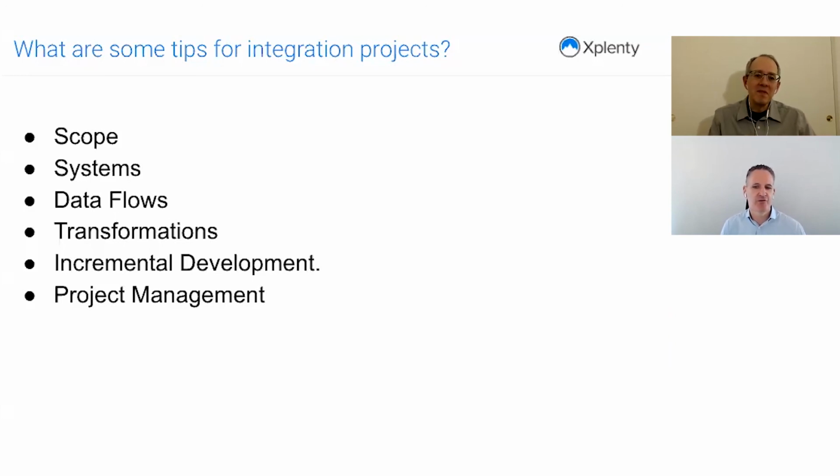And then I'm a big believer in constant communication about a project. So ideally having artifacts about the project, like what happened this week, what's going to happen next week, what are the risks, if there are risks that have changed, and then making sure everyone's aware of the decisions that have been made. So down the track, people can't say, well, I didn't know about that, or I never agreed to that thing. If you have it all written down and you have clear, constant communication with everyone, all the stakeholders should be on the same page and understanding exactly what they're getting.